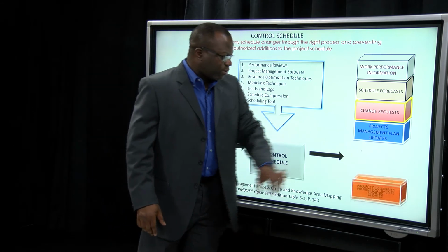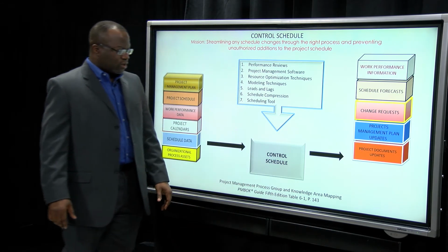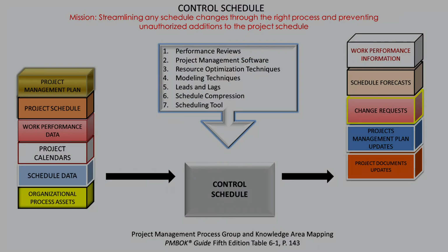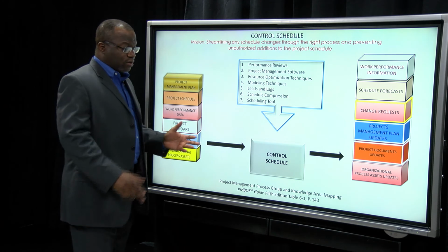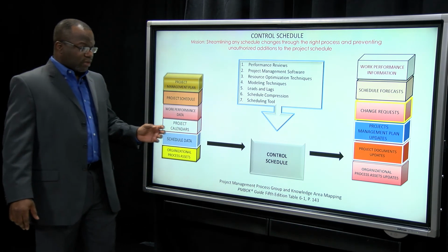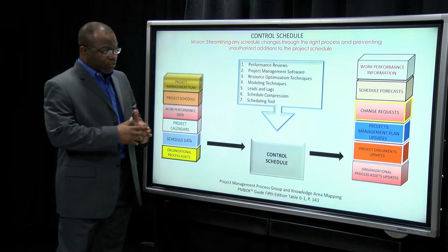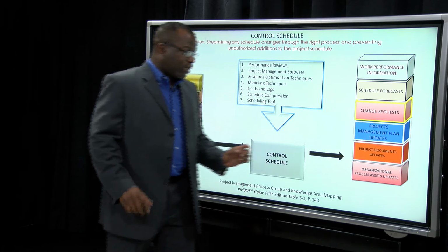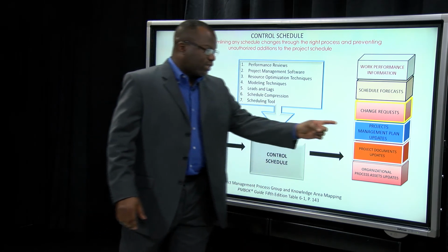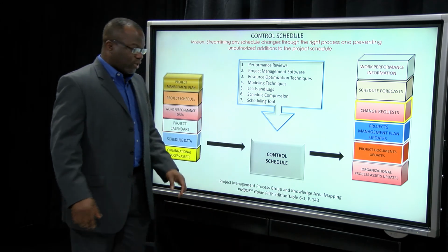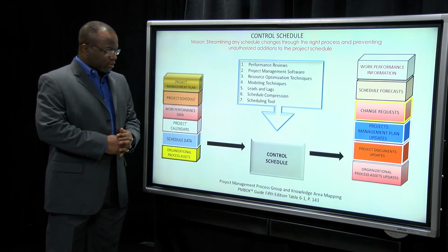All right, project management plan updates and project documents updates. We have quite a lot of stuff in this process, but we have one more thing. Can you guess what we have? Ta-da! Organizational process assets updates. This will encapsulate all your lessons learned across time management because you want to store those lessons learned in your organizational repository. And remember, if you see the word updates, don't mix it up with the actual items. This means these are outputs when you see the word updates. Let's jump into it and talk about this in more detail.